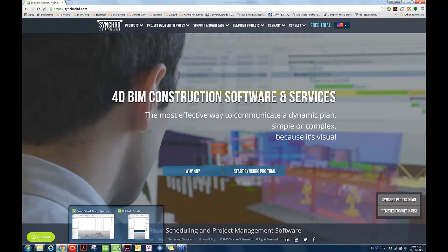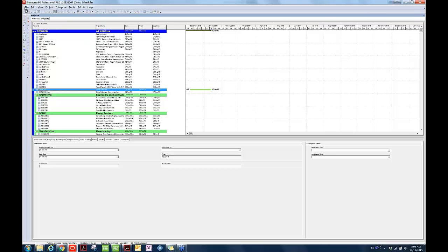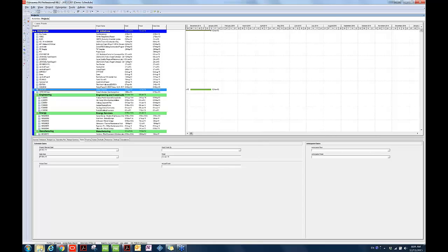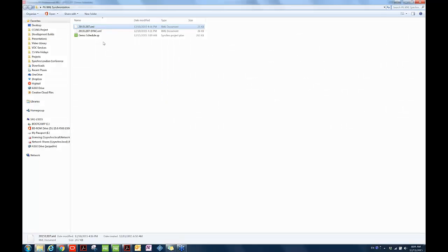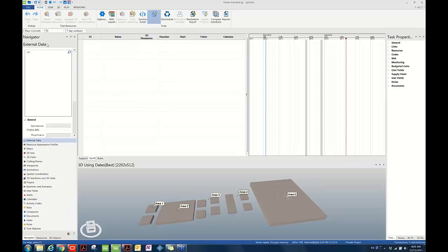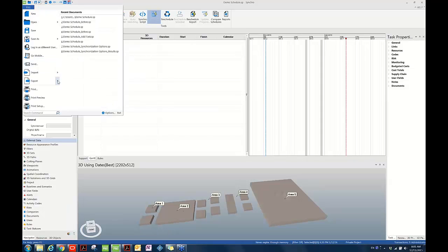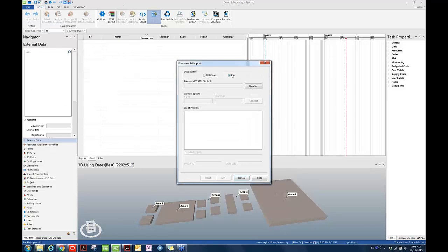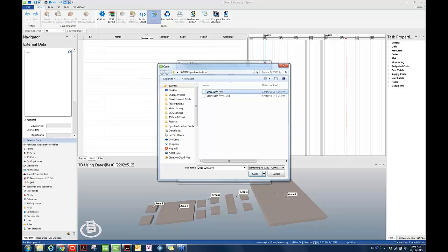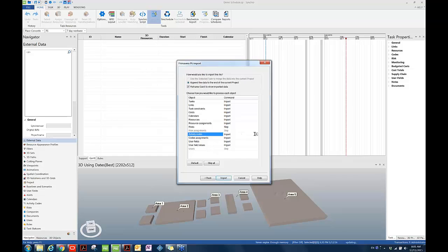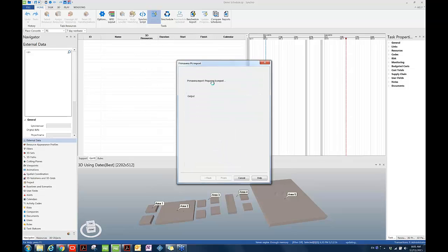For demonstration purpose today, for demonstration purpose of P6 XML synchronization today, we are assuming the following workflow. First, the P6 user exported his schedule from P6 in P6 XML file format. Let's assume the export has been finished and then he passed this P6 XML file to the Synchro user. The Synchro user is now going to import the P6 XML schedule into Synchro by going to File, Import, P6, Choose File, and then browse to the folder, choose the file provided by the P6 user, and then hit Next.